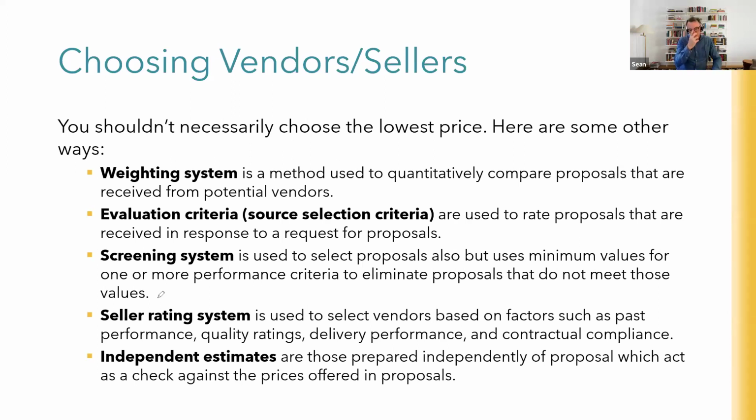We discovered something interesting, though, during the process. We discovered that, in this case, the council's insurance policy clearly stated that all large assets over this particular amount, now this was worth several millions of dollars, and I think the insurance policy says something like anything over $100,000, needed to be procured via the formal procurement policy, otherwise it wasn't covered by the insurance. And this was a bit of a clanger, to be honest, because they hadn't followed the procurement policy. Because the procurement policy clearly said anything over $100,000 had to go out to the market to a minimum of 3 potential vendors, and from that, the best one chosen.